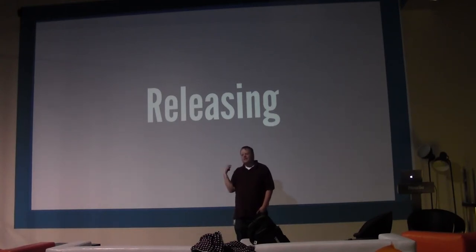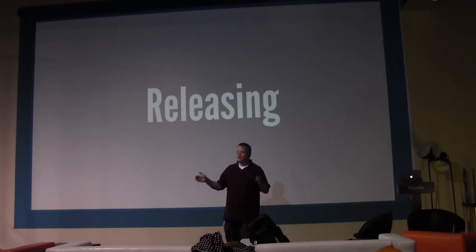And we say, you know what? The fuzziness, it's not super accurate. It's kind of the canary in the coal mine. It kind of gives us an idea. But over time, we're within about 10% of our estimates now at DDM. We sit down and say, this next 2 weeks, we're going to do this, and we typically have a 10% margin of error in that.